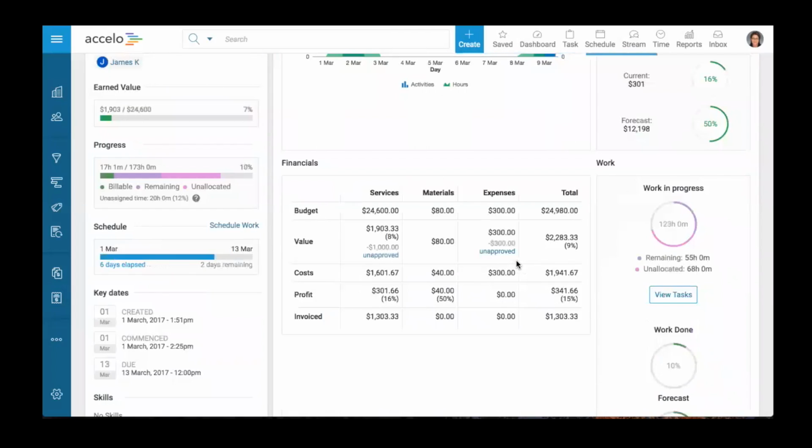Now what we'll see on the Insights tab is that one license that I sold and the 50% markup, as well as the expenses. I'm not making any profit off of this because I'm passing it straight through to the client. All this now totals to a complete profit margin of about 15% on the project.